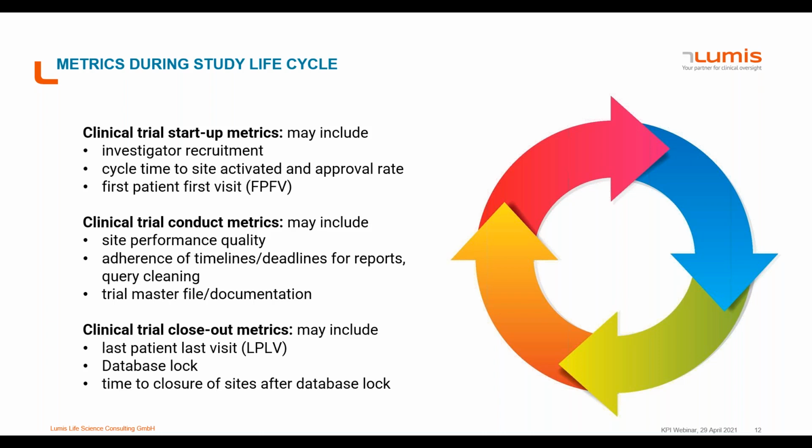Clinical trial conduct metrics. There, of course, the quality of the site performance is very important. Adherence to timelines, query resolution, trial master file documentation completeness. And during the closeout, some metrics may include last patient, last visit, the database lock timelines, time to close the sites. So these would be some examples. We will go into further detail later on on how to develop and use the metrics during the study life cycle.